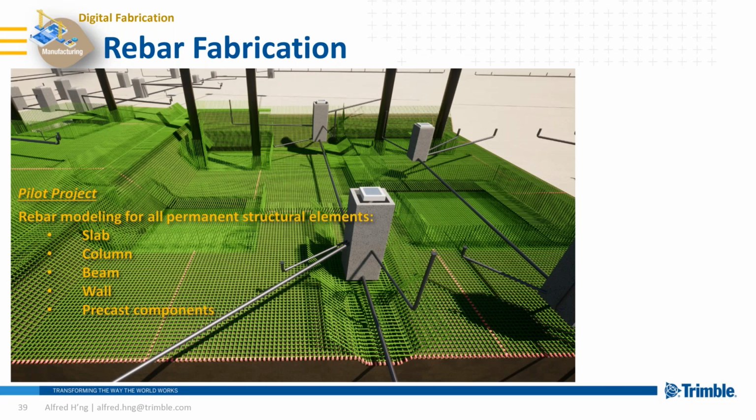All right, so we tried this workflow in one of our civil projects. In this pilot project, we split the implementation into a few stages. As the first stage, our aim is just to test out whether the concept of rebar modeling, with the shop drawing coming out from the model, can work or not.